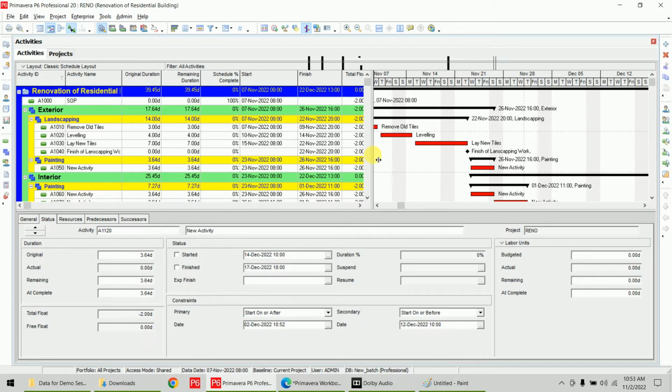I remember there are cases with constraints. For example, you have ordered an item. There is equipment. There is a manufacturing plan, let us say 6 months. 1 month is your transit time. So 7 months. So from now, let us say by next March 15 only, it can arrive at site. That is your mandatory constraint. Exactly. There are cases we have to apply. Otherwise, we keep on manipulating the dates and all, and it will not give a realistic schedule. I understand. Exactly, it is required in some of the cases.